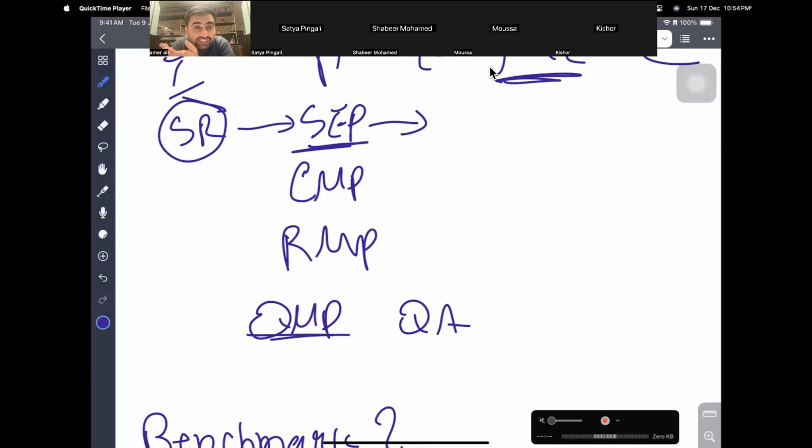We use check sheets, check how many defects are there. We do a checklist. We use the Pareto principle. We use sampling. We use various tools and techniques to identify that the right process is being followed and the right process is being done. And then in quality control, when the deliverable is made, the team checks the deliverable.